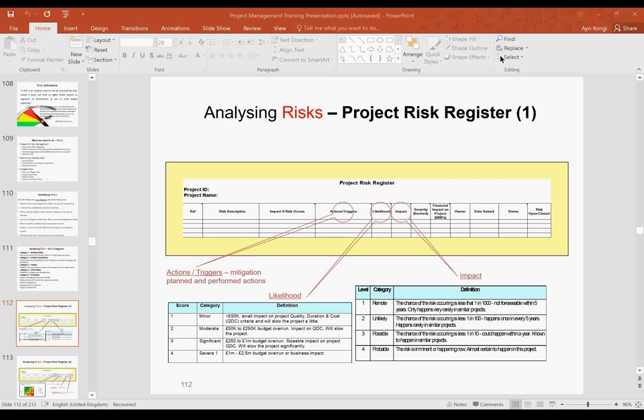So when you get on a project, you must have a standard reference number. And the best reference number you can use is risk 001, R001, R002, because don't forget that in our RAID log, we have actions, we have risk, we have issues. So you can say action AC001 when you want to document your action. But reference codes are very, very critical when you want to populate your risk register. Reference codes are very, very critical for you to use because you'll be referencing them. So you need those codes to be populated.